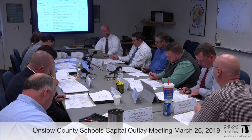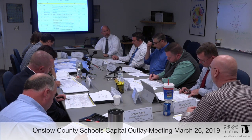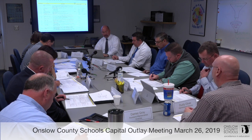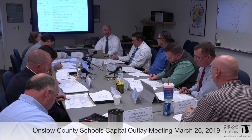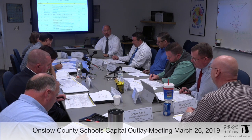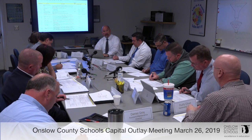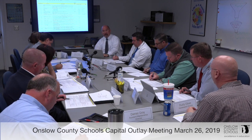It works. It's working now. It may work for another 20 years. It's just those components are no longer available. It's one of those things. It's a risk assessment, basically. It works well right now, and we have a couple of schools like that, yes, sir. If it fails, then it's going to be a catastrophic failure.